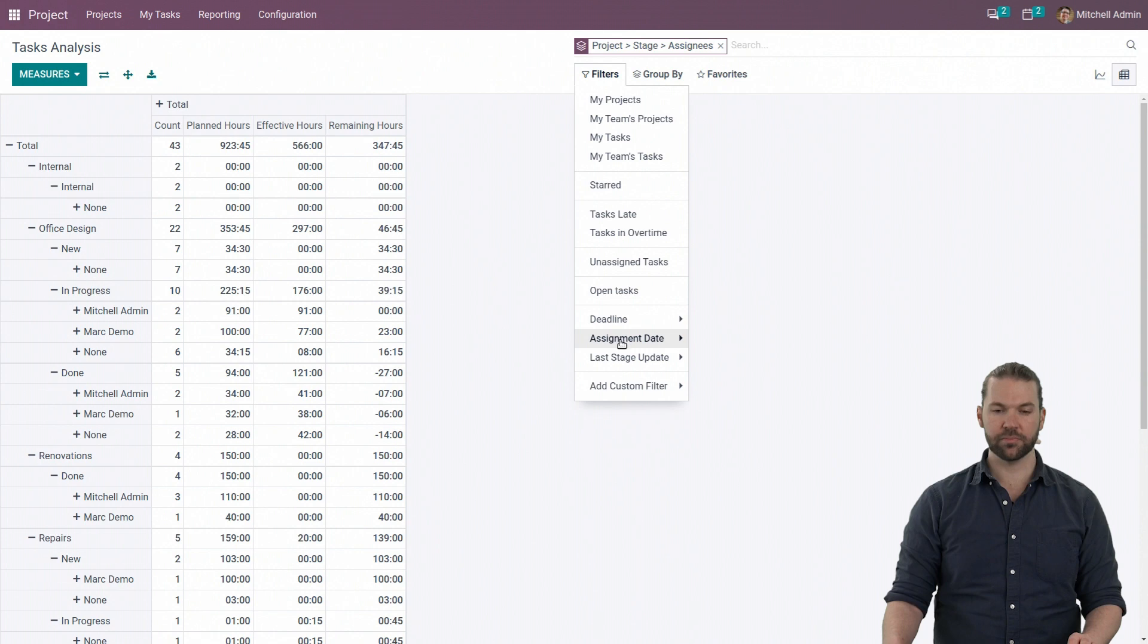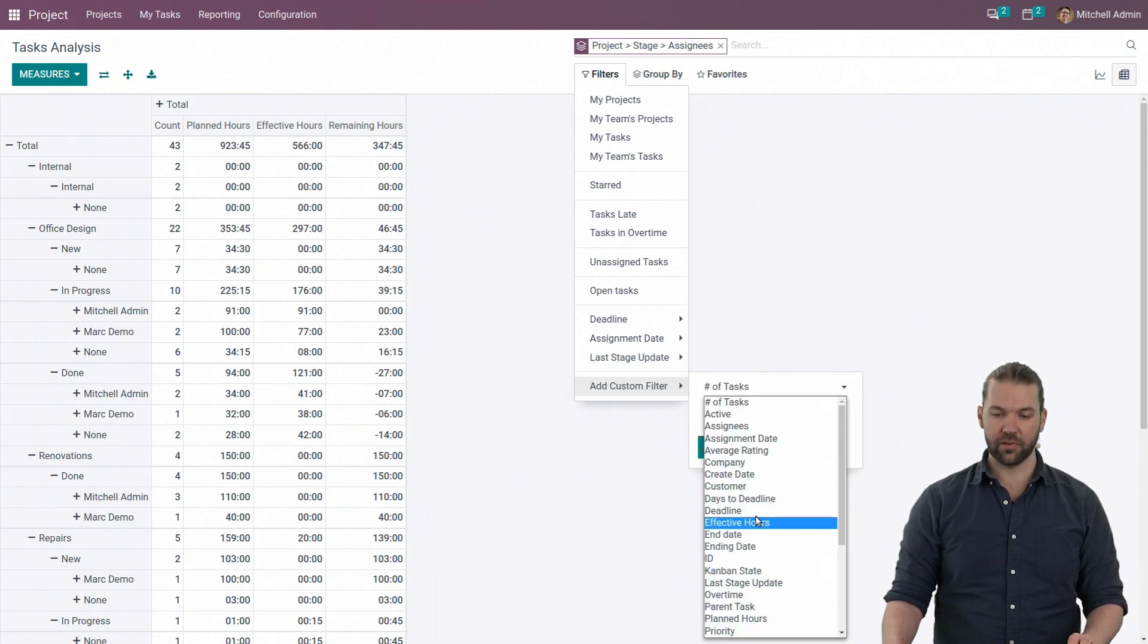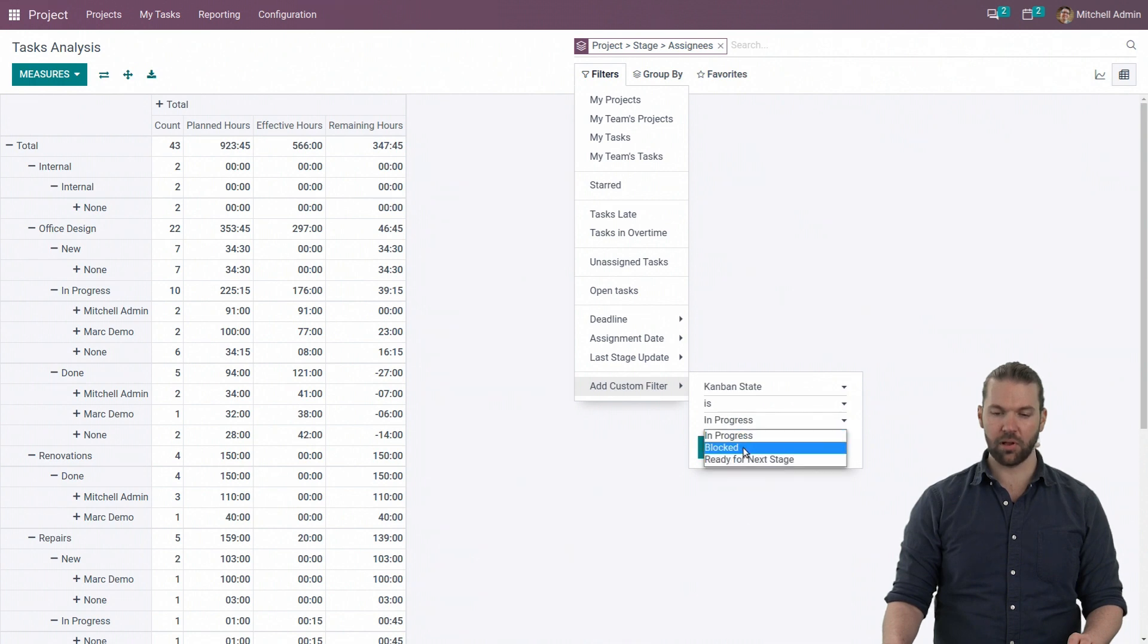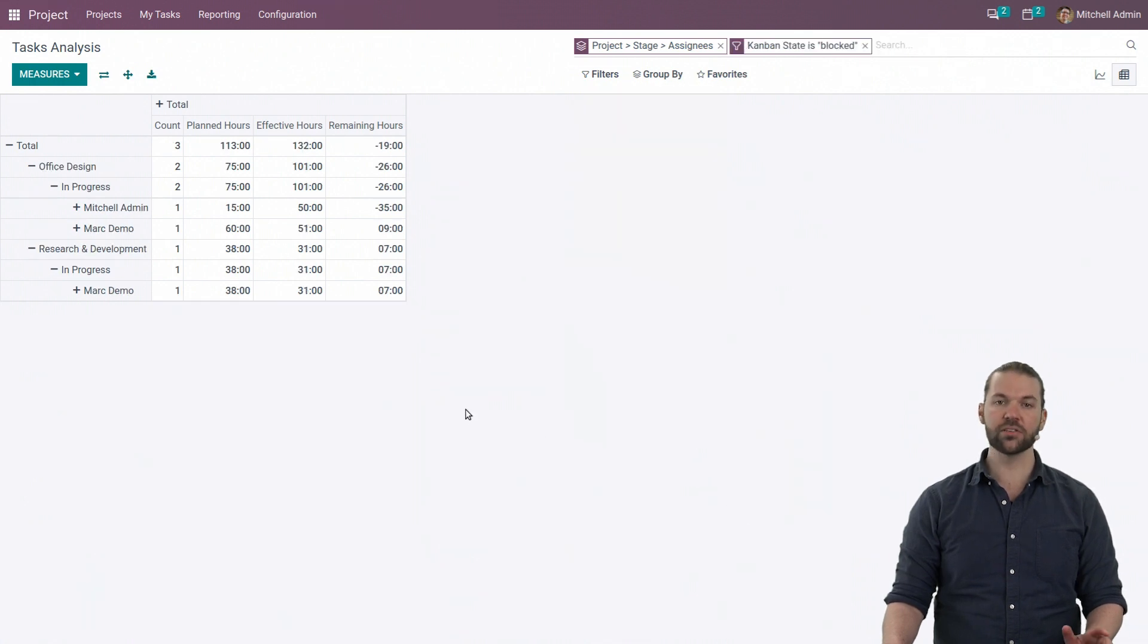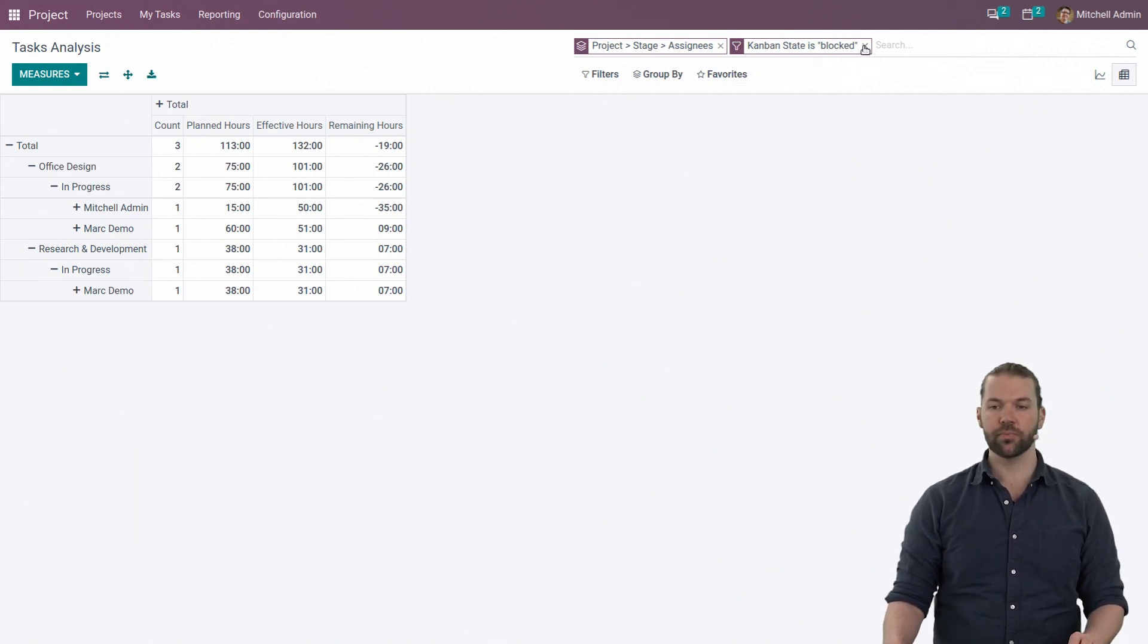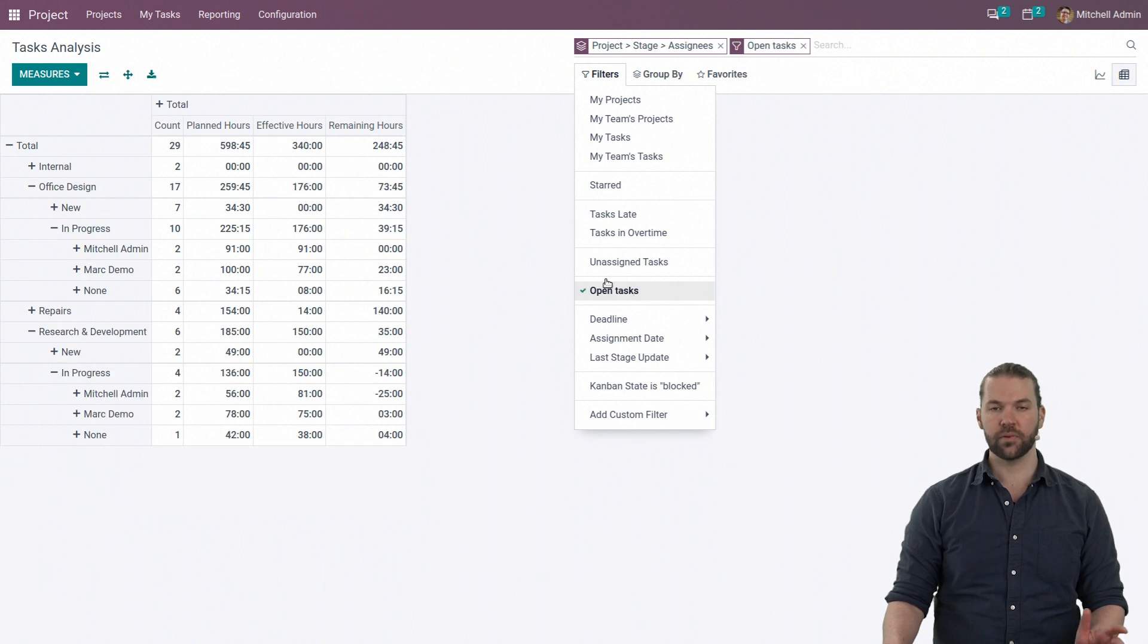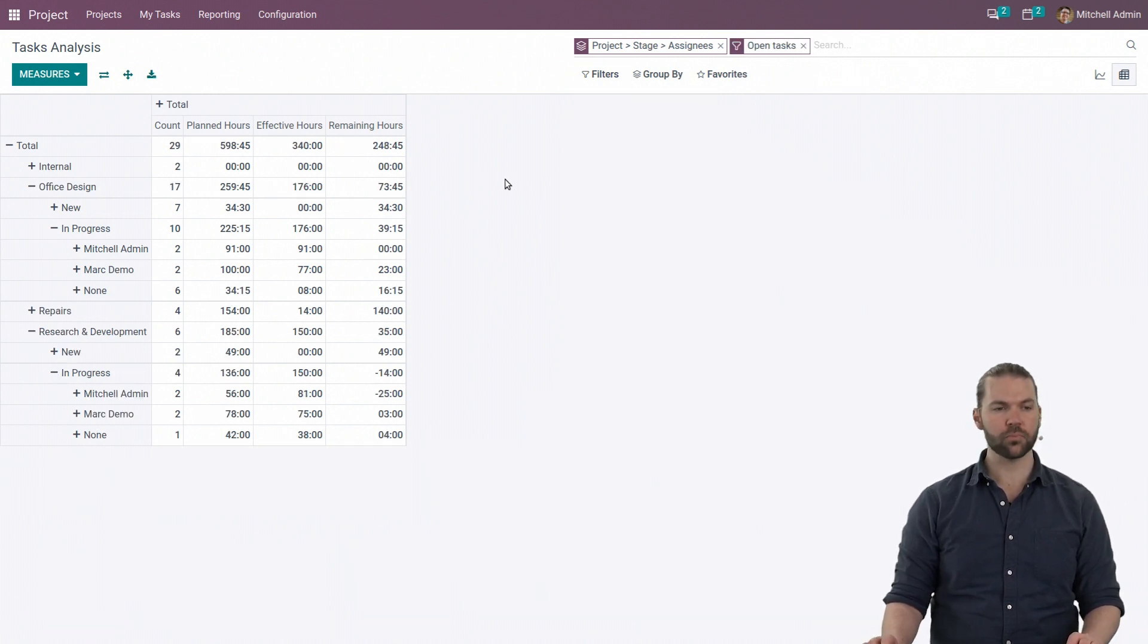So filters, add custom filter, we have the campaign states and blocks. So we know these are the ones that need highest priority. What we can also do is remove anything that is closed, just to focus on the important details.